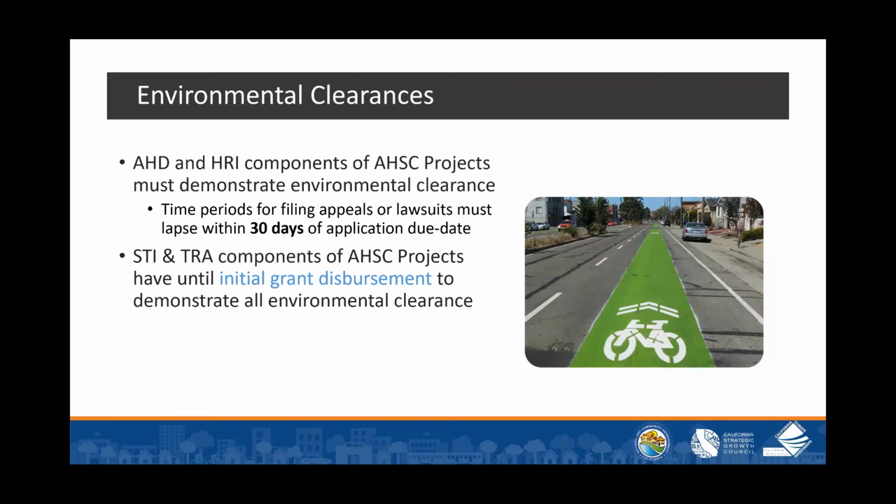For your environmental clearances, we have the affordable housing development and the HRI components of the AHSC project to demonstrate environmental clearance. So you want to make sure that the time periods for filing appeals or lawsuits must lapse within 30 days of application, that's due date. And for FTI and TRA components of AHSC projects, you have until the initial grant disbursement to demonstrate all environmental clearance.